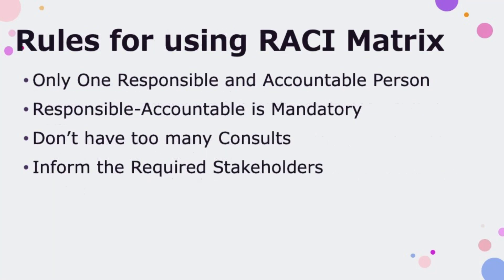Below are the common rules to construct the RACI matrix. Rule 1: Only one accountable party. If you have more than one party accountable for the same task, it would be like having multiple people driving a car — it will create confusion and malfunction.